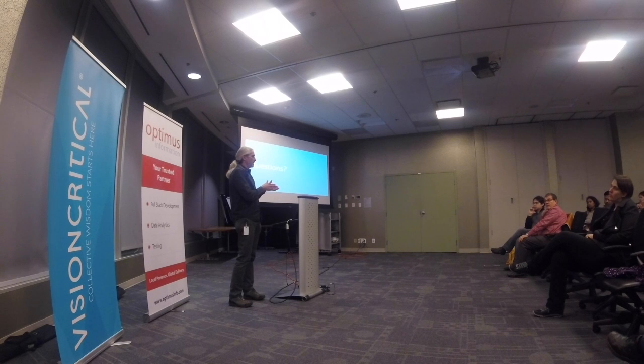But if you've got a fixed time and a fixed resource, like you were the only QA and you've got one week to do it, then if you start with the highest risk and work down to the lowest risk, you're just going to get through whatever you can manage. And sometimes you won't get through very far, because the first thing you try is the highest risk. It was definitely the highest likelihood of something going wrong. You find a bug, maybe you've got to stop.